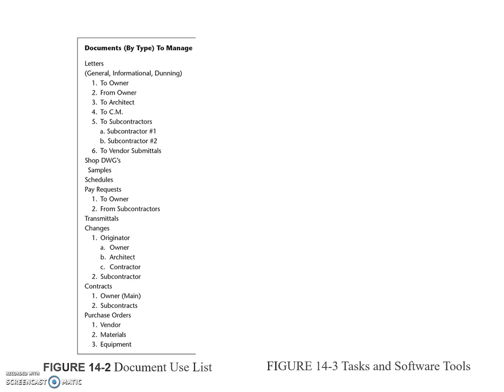Construction has not yet evolved into a paperless business, but the documentation and control of the general contractor's correspondence is an important part of the management picture. The control process suggested for storing various paper documents includes the use of logs for tracking both incoming and outgoing correspondence and for attaching an issue bar code to each.